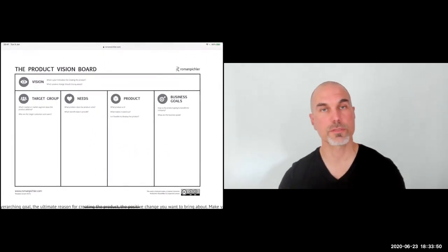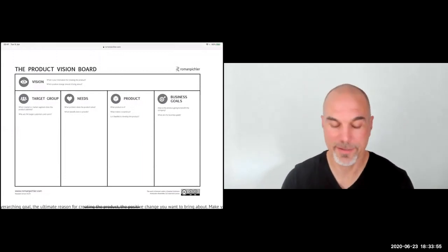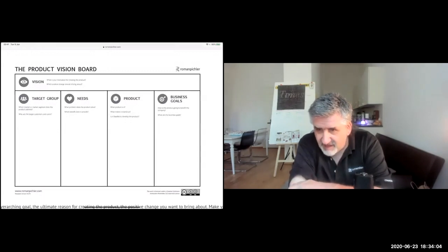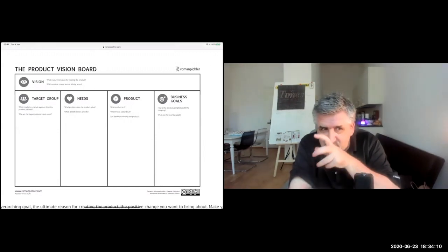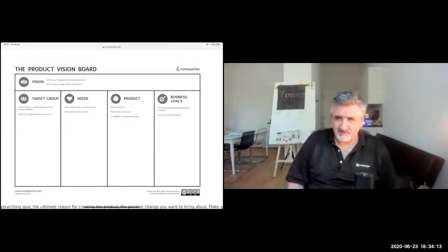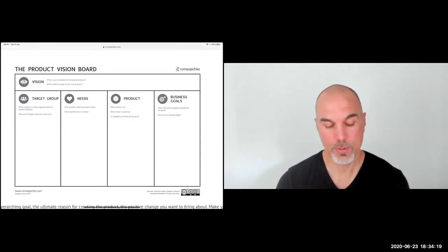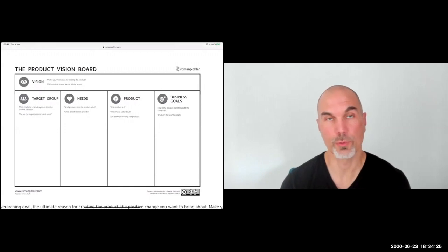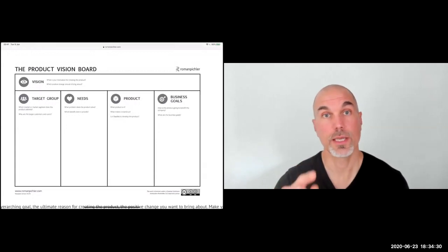I'll quickly show you the product vision board. What I call product strategy is described by the bottom four sections: target group, needs, the product, and business goals. And I would say you're done with product discovery when you have no significant risks or leap-of-faith assumptions left in those four bottom sections. As long as you have key risks or leap-of-faith assumptions left, you're not quite done. That's a good heuristic to understand: can we move on, or should we spend a little more time in discovery?